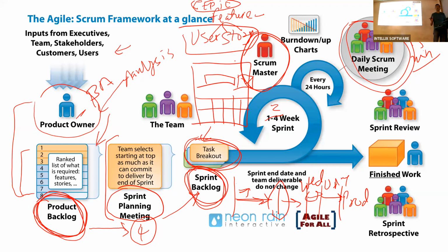Similar activities, but a Scrum Master might have 5 different projects they are working on, managing those sprints, just like QAs. Typically, developers are working on one project because they are focused on delivering the software. QAs might have 2 to 3 projects easily. Same thing, a Scrum Master might have 5 to 6 projects easily. They are managing them.